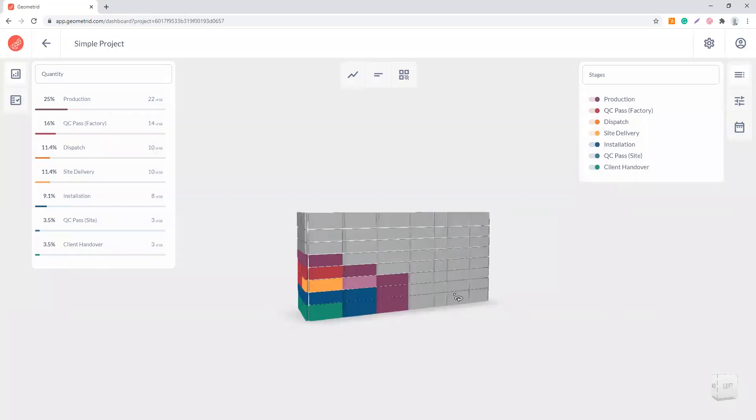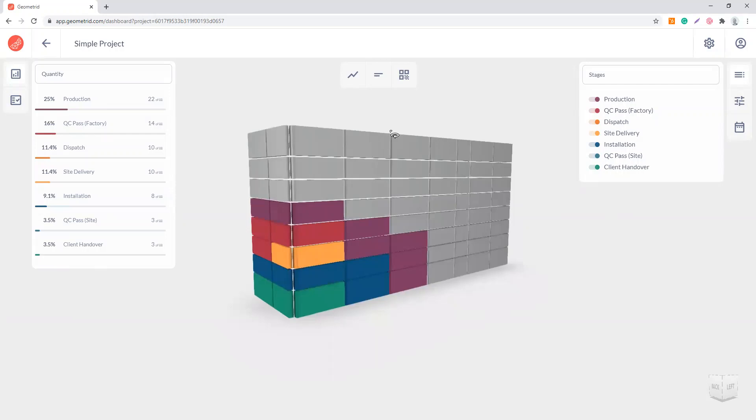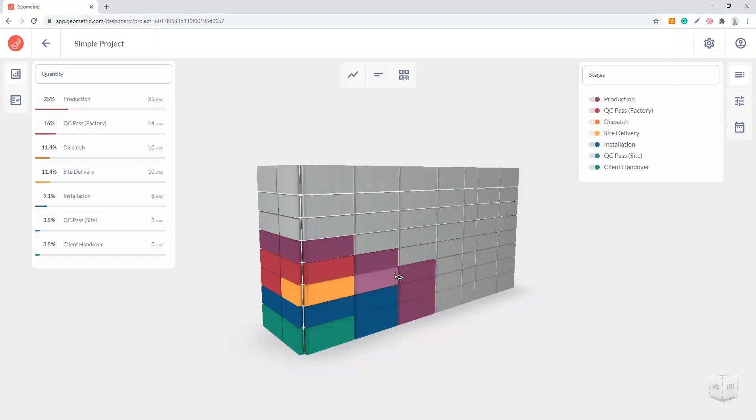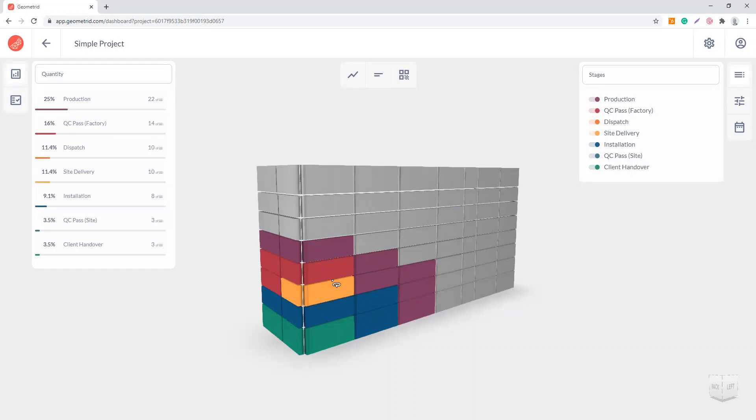Once you click on the card, you can open your project. The first thing you will see would be your 3D model, which is a central feature. On the right side of the screen you can see the stages that you have previously set up for tracking and the colors for those stages that are assigned. The elements you see on the building model itself are going to be colored in the stage color depending on the status. What you see as purple in the viewport would mean that these elements are completed in the stage production. Yellow is delivered on site, green is handover to clients, and so on.